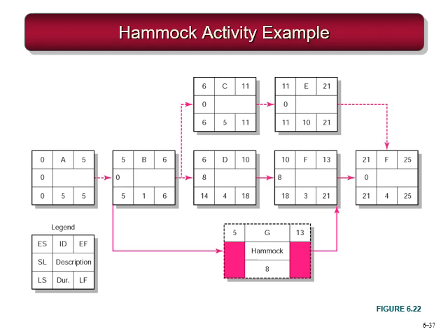So over here, activities B, D, and F are part of that hammock. So we designate that by activity G, which can be broken up into activities B, D, and F. So all these three activities together make activity G. So this is the example of hammocking.